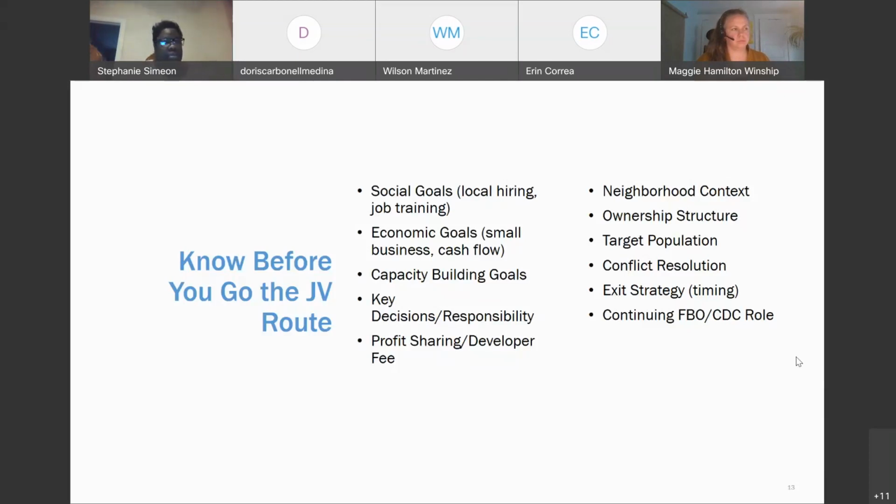And again, always keep that pro forma first and foremost. You want to look at that budget. And again, I would say for me, if you're going to go the joint venture route, you might want to vet folks before you start doing a deep dive in the community engagement. Because when you start the community engagement, you want to show people that we've done our feasibility.